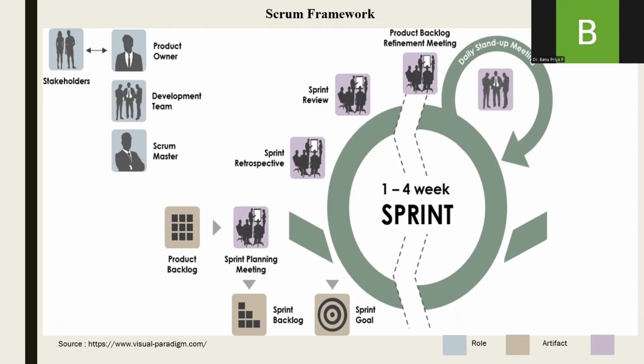And these user stories will be implemented based on sprints. Which user story should be implemented first will be decided based on the MoSCoW principle, based on the priority, based on the importance of the feature or the user story.